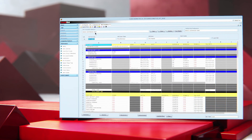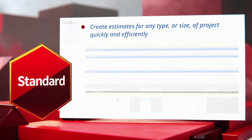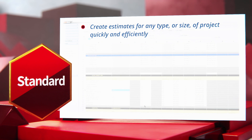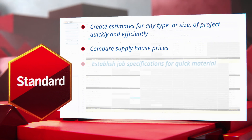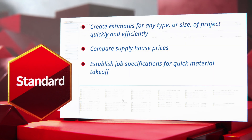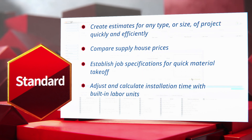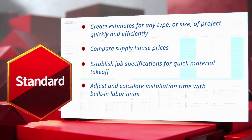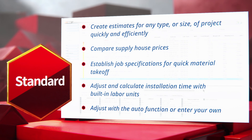IntelliBID comes in three versions. Standard lets you create estimates for any type or size of project quickly and efficiently, compare supply house prices, establish job specifications for quick material takeoff, adjust and calculate installation time with built-in labor units, and adjust with the auto function or enter your own.